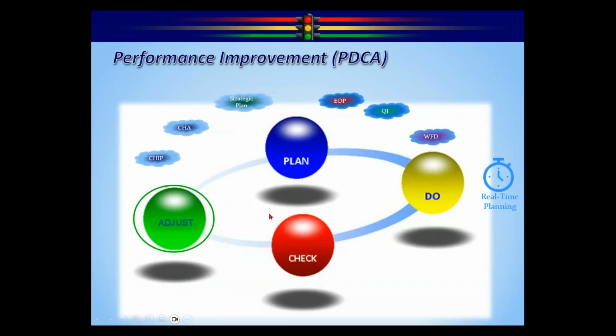So now we're going to want to make an adjustment. Got a couple of choices in the adjustment. Depending on the surrounding situation, like, we got into COVID, realized we're not going to be able to add any resources to this particular program for quite a while. Maybe we want to adjust the plan down to where we are. In this case, it's sitting at a 21% reduction. Let's take the plan down to 21 and try to keep enough resources going to keep it at a 21% reduction. The other thing, if possible, we could add to the resources.